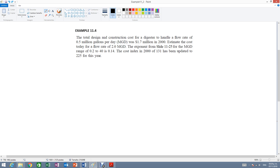Example 11.4. The total design and construction cost for a digester to handle a flow rate of half a million gallons per day was $1.7 million in 2000. Estimate the cost today for a flow rate of 2 million gallons per day. The exponent from slide 11-25 for the million gallons per day range of 0.2 to 40 is 0.14. The cost index in year 2000 of 131 has been updated to 225 for this year.